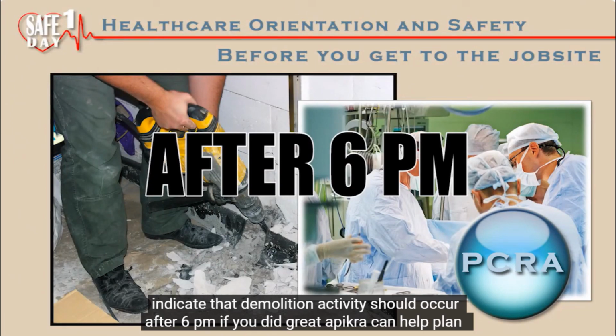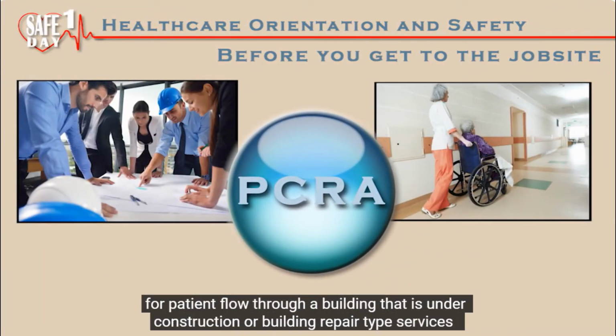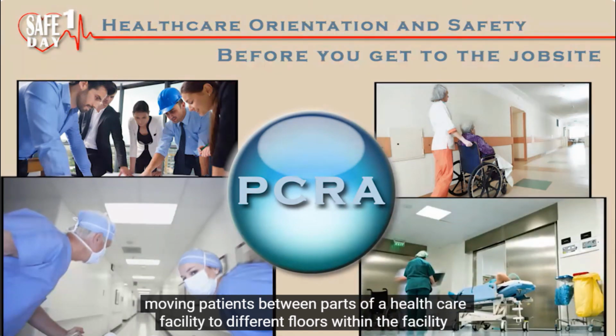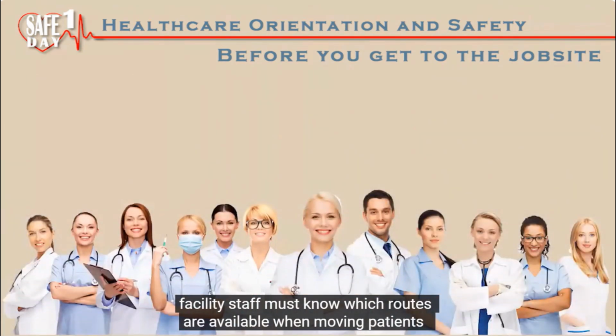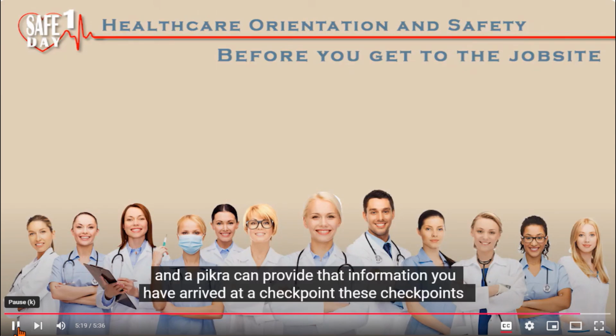If you did, great. A PICRA can help plan for patient flow through a building that is under construction or building repair type services. Moving patients between parts of a healthcare facility to different floors within the facility, and even different rooms on the same floor can increase the risk of acquiring an infection. Facility staff must know which routes are available when moving patients, and a PICRA can provide that information.